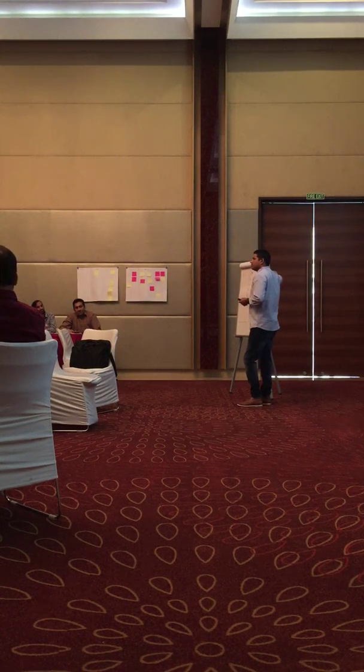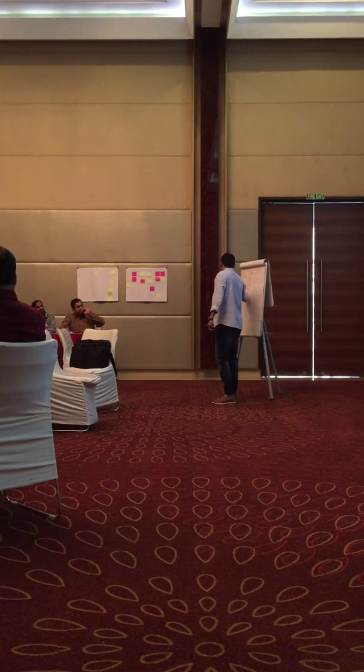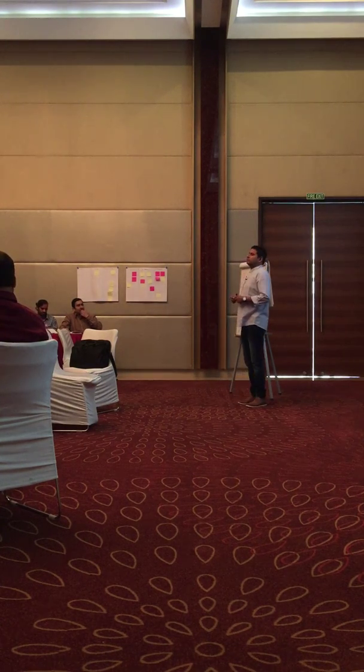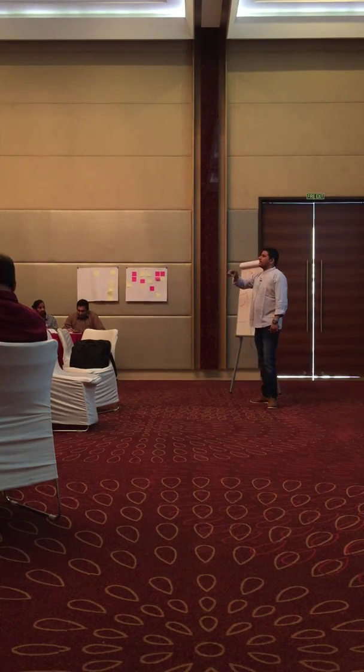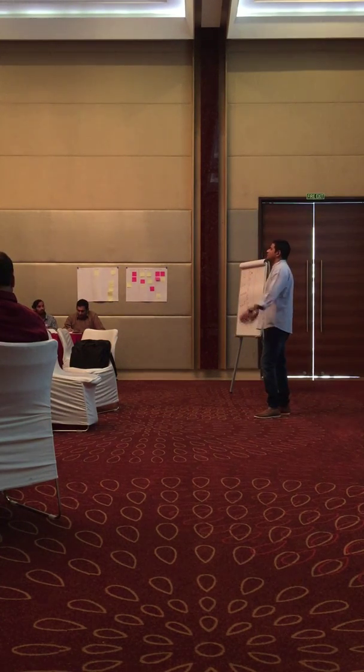Yes, large in size, where you want to split it into multiple things because it does not fit in a particular sprint, right? How to split, we will cover in the next step. But each user story should satisfy the 3C characteristics. First C is for card, second C is for conversation, third C is for confirmation. So whenever you have a requirement, it should first be written on a card, which is high level. You see the post-its, right? Why are they not A4 size? Can somebody tell me? Why don't we have A4 size post-its?